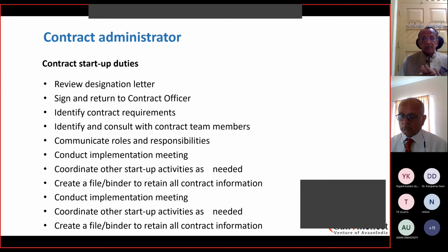Now, in most projects, there is an everyday meeting. The purpose is to evaluate what has transpired on the previous day, and at the same time to chalk out what is new for the day. When you evaluate the previous day, what are the items, how the job has been carried out, was it according to the schedule, and if there is a delay, that delay has to be explained. What is the reason for the delay? So there is a continuous evaluation, a continuous process as to how and where you stand as far as the project is concerned, and everything has to be logged down.